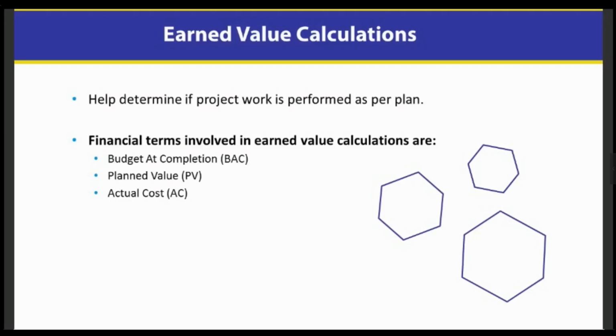Well, we talked about time management, so let's talk about time a little bit. If time management is an issue and we're behind schedule, then there's a couple of things that I might do. You have fast tracking or crashing. Fast tracking means that I had 2 activities that were finish-to-start. That means I had to finish one before I started the other. But they were effort driven, meaning I can put extra people on them and do them at the same time, or do them faster, one of the two. And that would be fast tracking.